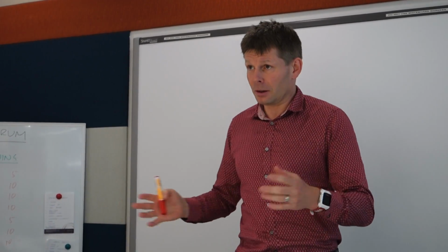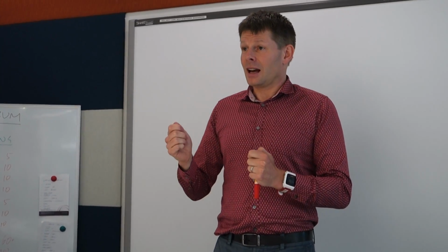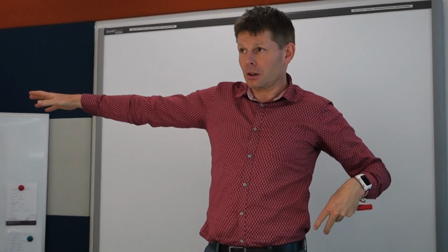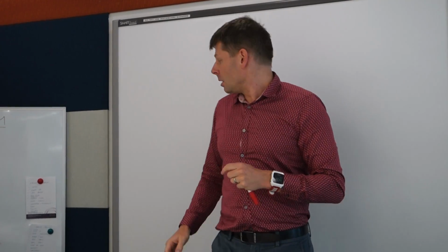Now, I use planning poker, so we can use poker cards to estimate in user story points. And from that, we can ask questions of the outliers. And that can then unearth knowledge centers, where certain people may know something that other people don't. And so we can then collate all that together, re-estimate and see where we start to trend.